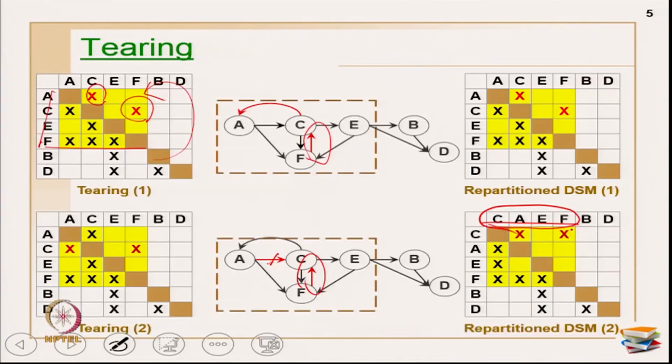good? Okay. To answer that question, you have to really do iteration modeling, which implies identifying the duration of this particular block. So, go through this, plot your durations along the diagonals, add values along this, primarily the rework probability: what is the percentage of rework, or what is the probability that any change in activity A affects activity C or something, that you may have to redo it, and then see what is the duration for this entire project, or what is the duration if I go through this particular sequence of project execution. You have to really cross check that, and then you choose the tear marks and then go ahead.